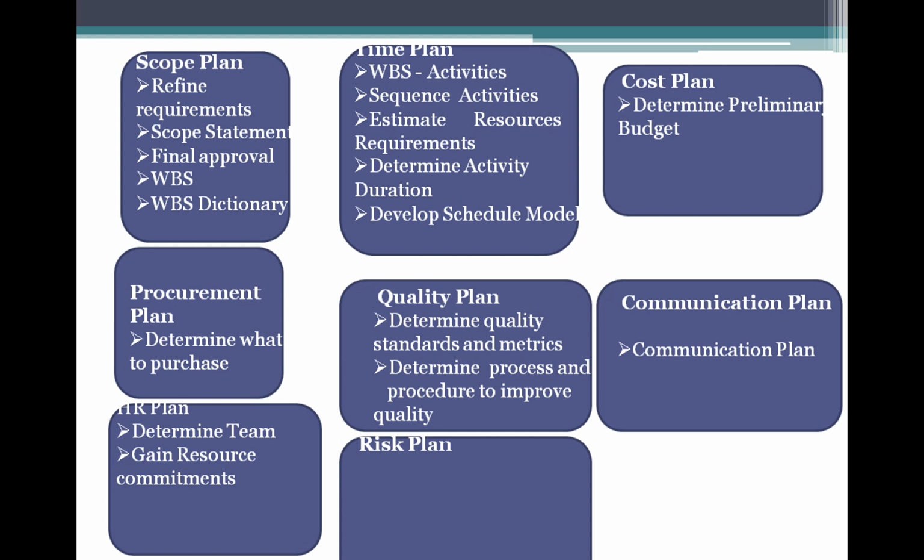Then the communication management plan. In the communication management plan, he prepares the plan. This management plan tells what the stakeholders are, what information is to be sent, to whom to send it, when to send it, what the communication methods and channels are, and what to do if communication blockers come up. These are all updated in the communication knowledge area, under plan communication.